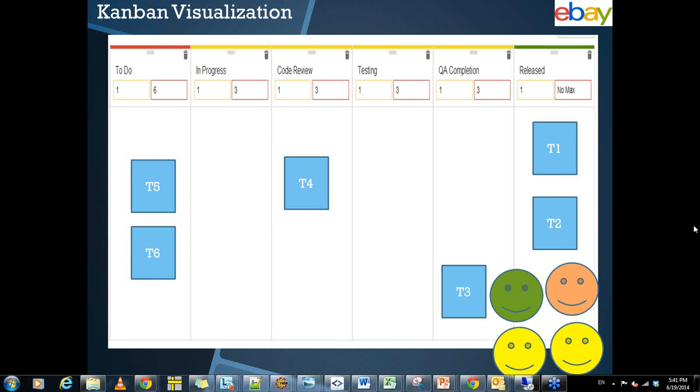Okay, so the next question I have is, when the product is related to production and the resources are working on enhancement, if priority is not defined, how do we handle the important requests that need to go to production in a predefined time? Okay, so again, this is about exceptions that come in at the last minute. The idea here is, when you limit the work in progress to 2 or 3, at least one task will complete quickly and move to the next stage. So you will have the capacity to take up anything like this that comes. But worst case, in case of an exception, you can customize and actually deprioritize a task and take that up.